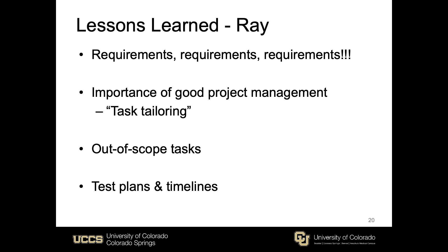Lastly, I'll cover the importance of having detailed test plans and realistic timelines. Looking back, we busted nearly every single timeline we established this semester. I'm not sure how to make realistic timelines for complex projects at our level of experience, but it isn't a skill I have. Realistic and attainable timelines are important because busting them not only slows or halts production further down the line, but it also demoralizes the team. Tying this into test plans — I don't think we allotted enough time to testing. My takeaway would be to allot at least half of the total project time to debugging and testing.